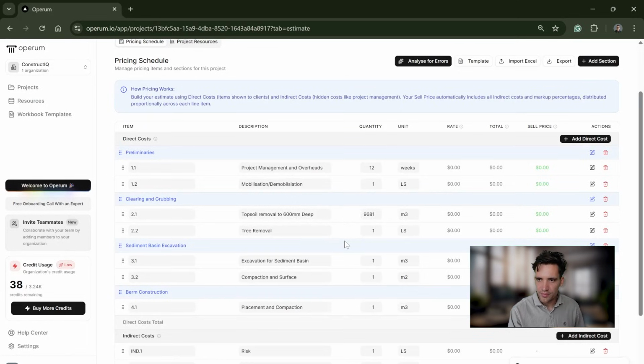meters cubed. Now, this probably wasn't the smartest way to do it, because that should be topsoil. Often you get charged a higher rate for the green removal, the grass at the top, so I probably should also include that as a quantity.